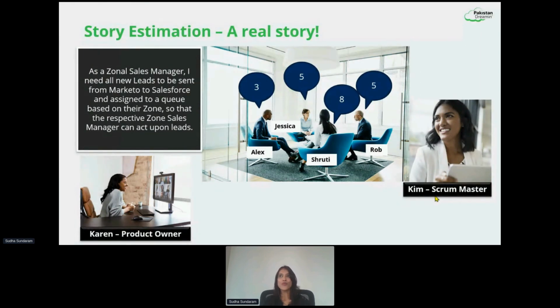So what is very important to note here is we don't do a few things. The golden rule is when such scenarios happen, and this is going to happen in most of our user stories, right? We all have different thought processes, so our perspectives are going to be different. Never go with a lower number. Don't go with a higher number. Definitely don't average it out, right? None of that we are doing. So the golden rule is never do that.